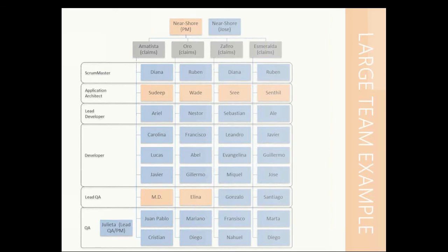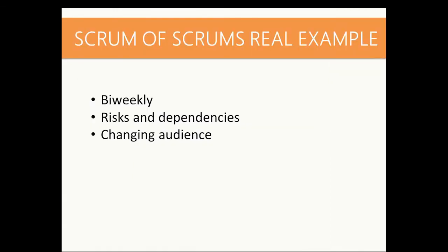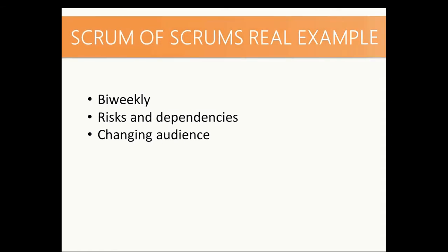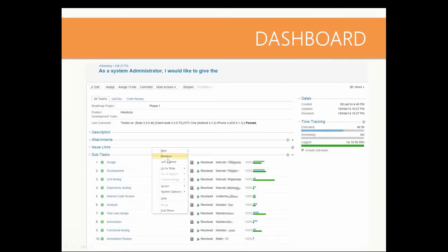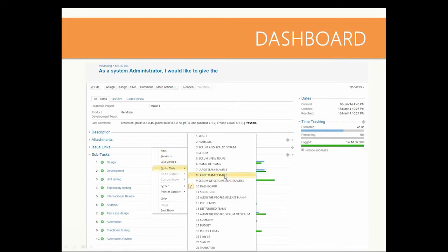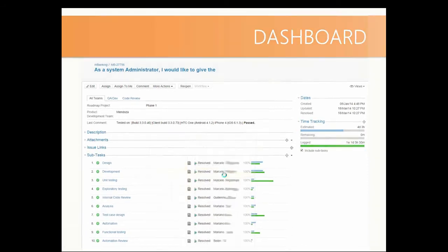Would you mind going back to the previous slide, because then I can really point at a few things for the people in the audience. I think if you visit a Scrum Master training or a Product Owner training, you will often get the answer to your question that the Scrum Masters will participate in the Scrum of Scrums after they have conducted their own daily Scrum meeting with their own team. And that works well. There's nothing wrong with that.